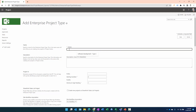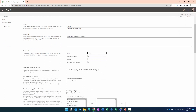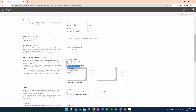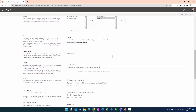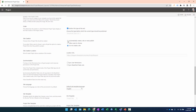We're starting with Information Technology as the first EPT. We'll put a project ID template to generate project IDs from — starting with 'IT_', first number 100001, with padding incrementing by one each time. There's no workflow. The new project page will be Project Information, and we'll add the Project Details and Schedule pages. There's a URL for a small image next to the selection in the EPT dropdown. We want the project site created automatically when the EPT project is first created.